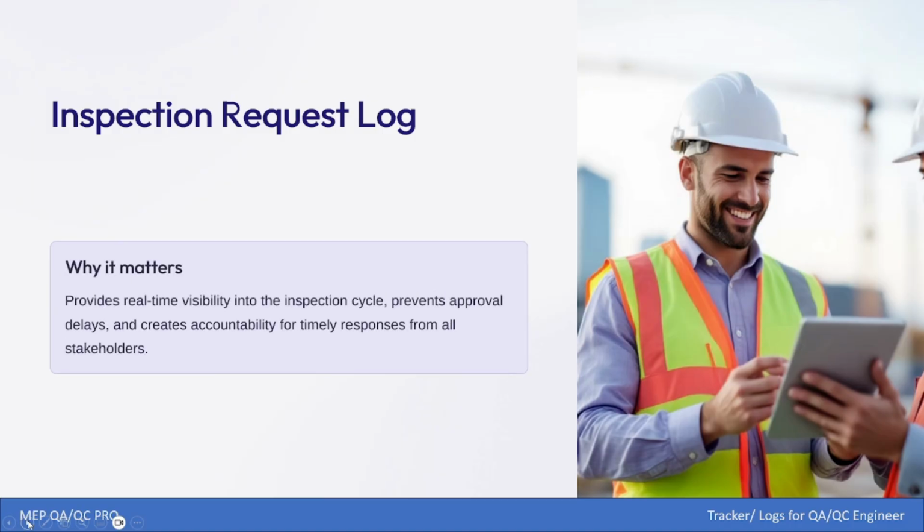So why does it matter actually? It matters because you can prove it if there is any delay and someone is trying to blame you, asking why there is a delay and why it is not submitted yet. If you have already submitted the work, but your project stakeholders are still blaming your team, from the inspection track log you can show them that you already submitted the inspection on this day, and the inspection is under review with the client or consultant.